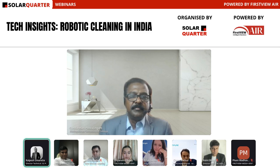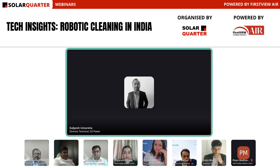So, Mr. Sundaresan, being a user, let me answer this question also. I am operating many projects with smaller project sizes, having 3 to 4 robots, or in some sites 8 to 10 robots. While purchasing the robot itself, we have a list of spare parts recommended by the OEM as well as based on our past experience. First, you need to have all the spare parts needed on site, whether it is one robot or 3 robots.